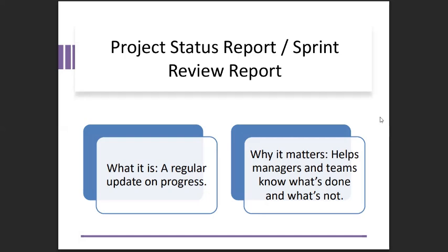The project manager is involved in documenting the project status report and sharing it with the entire team, including the program manager, clients, and any other stakeholders who may be required at any time in the project. So the essence is to provide regular updates. Sometimes it's a weekly project status report, sometimes monthly, sometimes quarterly, depending on the size of the project and the duration that the project has been set to complete.